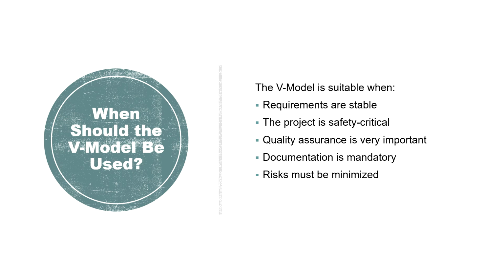So when the V model should be used? When the requirements are stable, quality assurance is critical, documentation is required, and risk must be minimized. So that is why mostly in banking system, medical softwares या aerospace software या defense या कोई भी ऐसा software जो safety critical हो, so they normally refer V model as compared to the waterfall model. लेकिन however, it is not ideal for projects when requirements change frequently because modifications are very expensive.